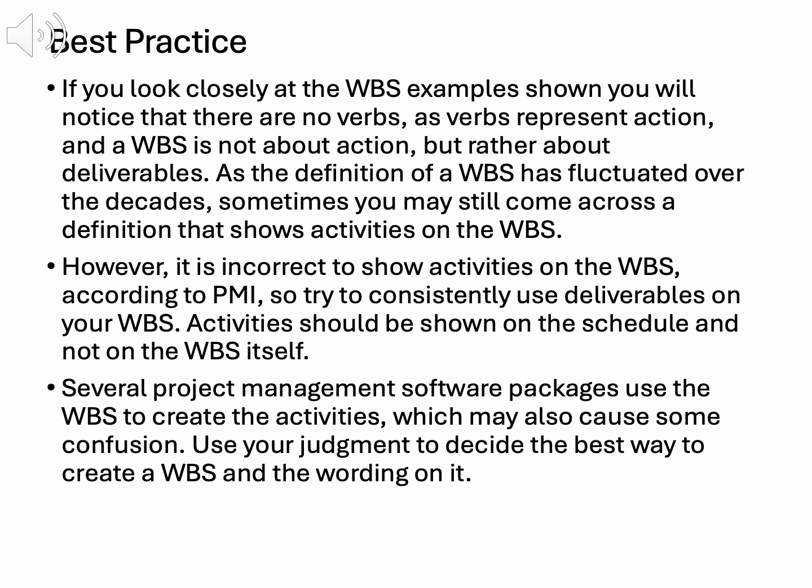Some project management software blurs this line, using WBS deliverables to generate activities, which can cause confusion. As project managers, use judgment to maintain clarity, ensuring the WBS remains a scope-defining tool. If software generates activities, verify they're separate from the WBS structure.